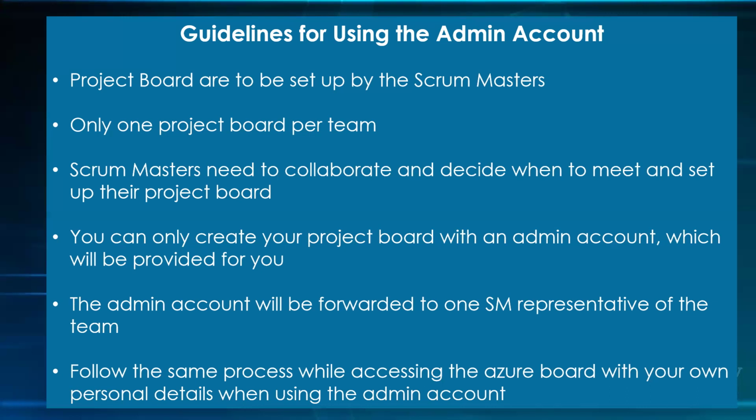You're the one that set it up. You're the one that will set your sprint board up and things like that. That's why you're the one that we're giving this admin account to. And like I said, it's just one project board per team. So if I am in the same team as another person, I won't go and create a separate board just because I have access to the admin account and I know I can create it. We don't want multiple boards created by the same team. That's why we say you have to come together and collaborate.